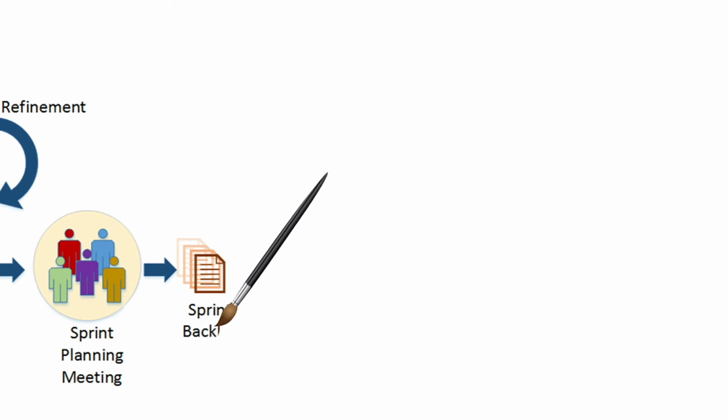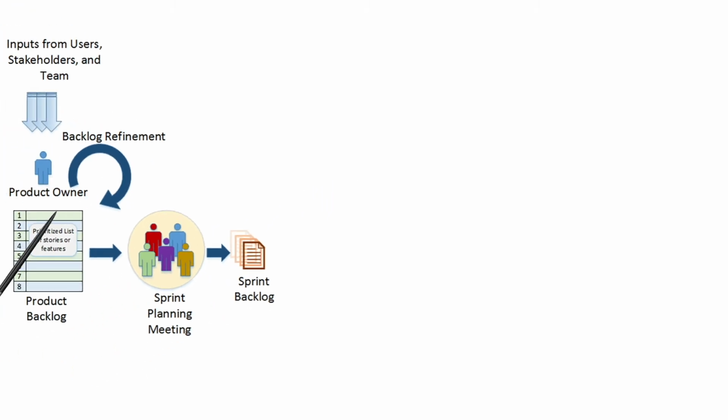A common way Scrum teams estimate is called planning poker. Planning poker is a wideband Delphi technique for estimating. In planning poker, the teams are using story points to develop a relative sizing estimate for each user story. Typical planning poker decks roughly follow the Fibonacci sequence of values: 1, 2, 3, 5, 8, etc.